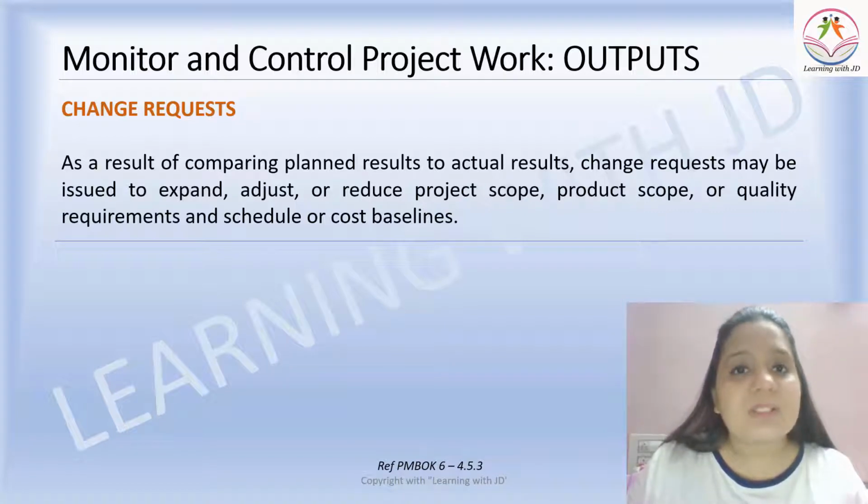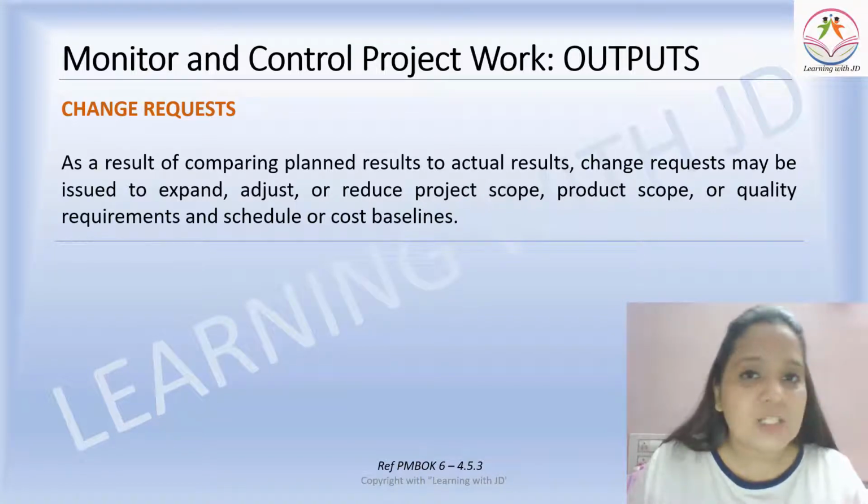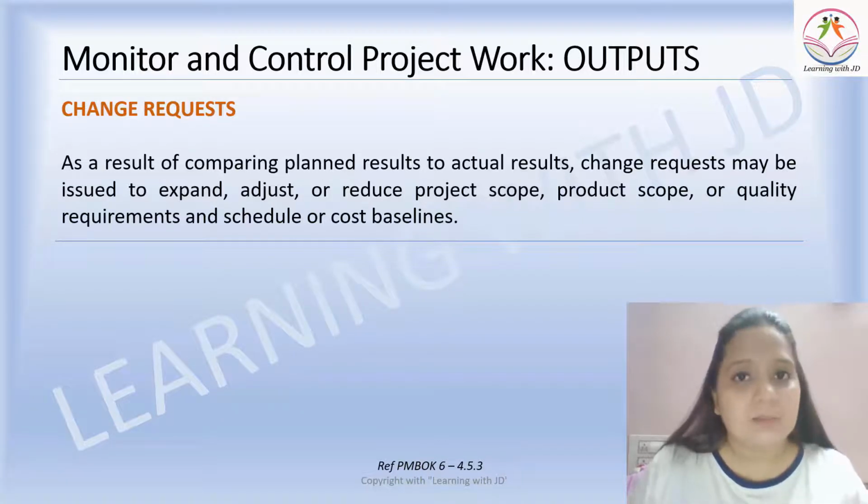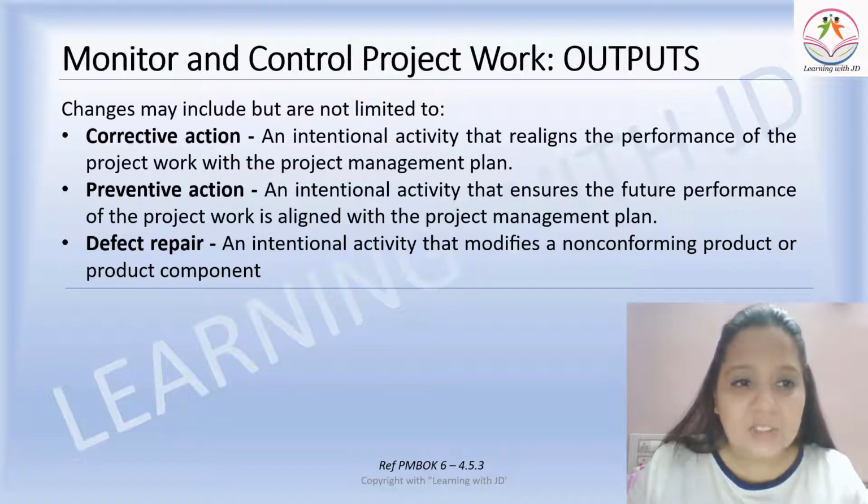Now, will this change request directly go to direct and manage project work and the work will be executed? No. These change requests will go to perform integrated change control, PICC. Only after that will the work begin. Changes may include corrective action, preventive action, or defect repair.